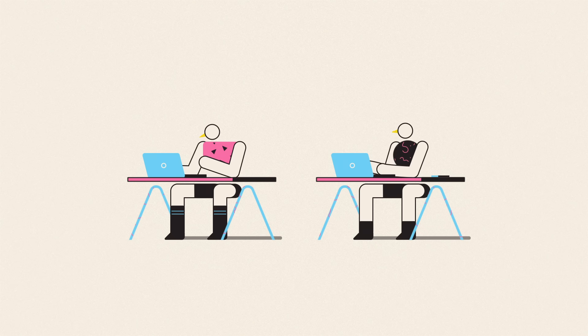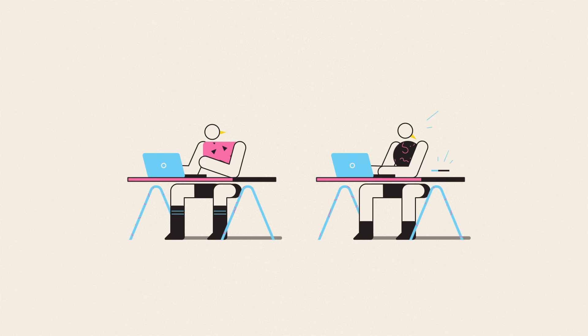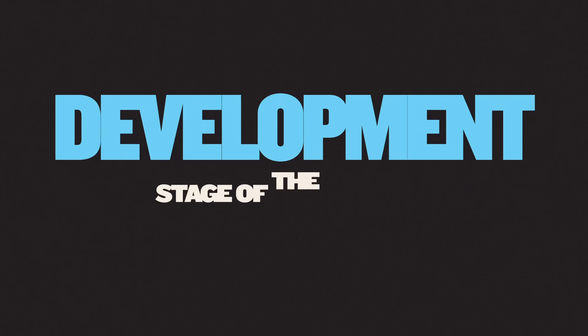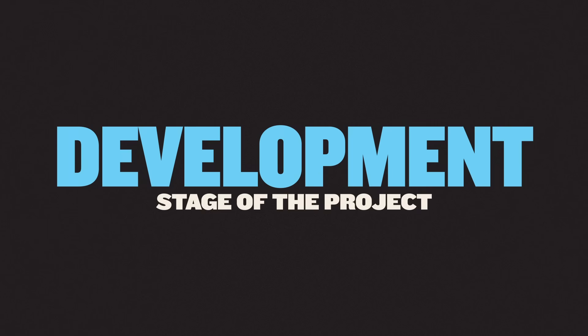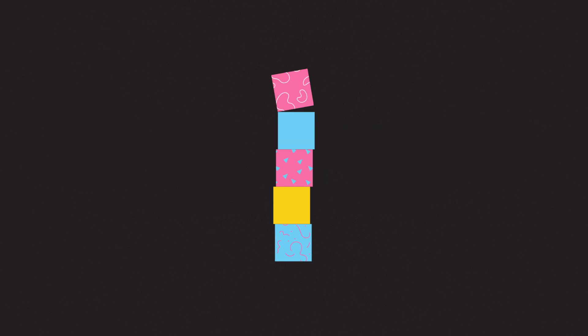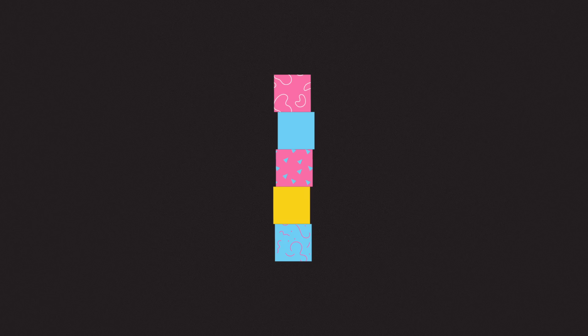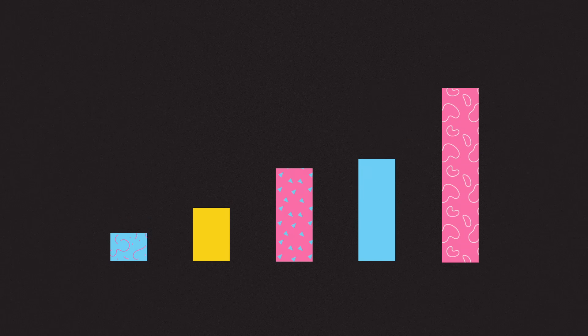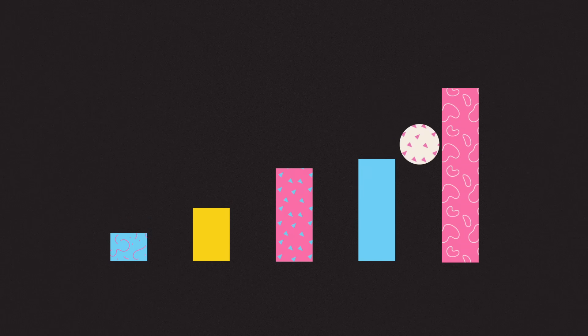Well, first, I can guarantee it doesn't work more often than it does. How true it is for your individual project will ultimately come down to a combination of things. The first being the project's development stage. Brooks' Law refers to late-running projects, and it gets more and more relevant the later a project gets. But while additional workers added to a project early enough might be able to complete it in less time, ultimately success depends on a myriad of factors.